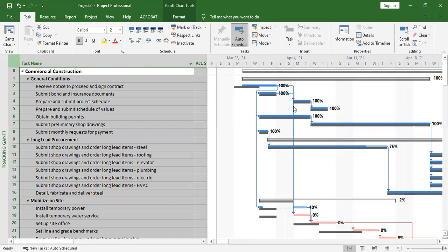If my activity C depends on 2 activities, activity A and activity B, and activity A ends on Friday while activity B ends on Wednesday, when should activity C start? It starts after the other long one, so it has to wait for the other one.